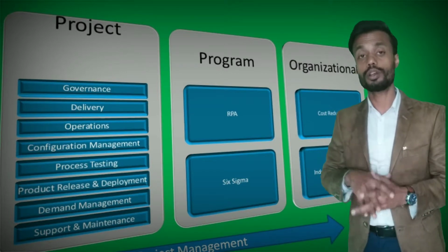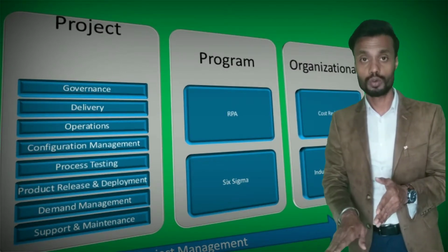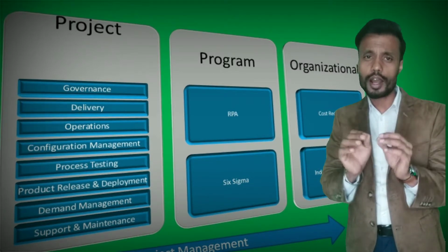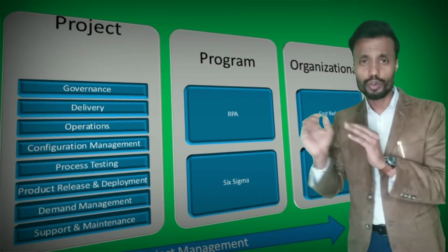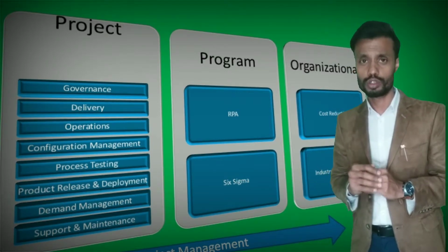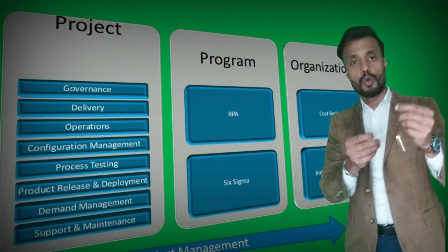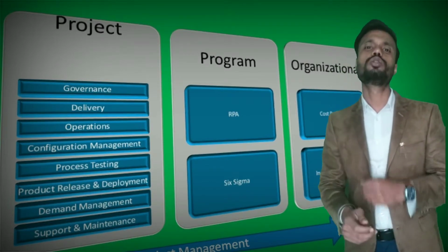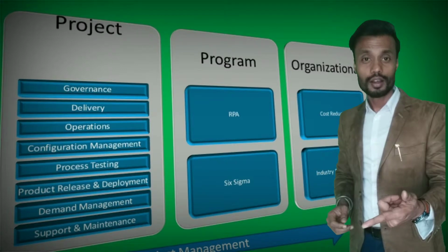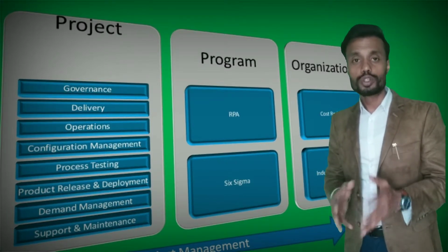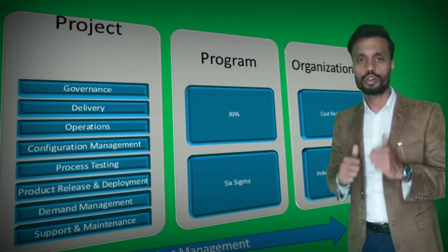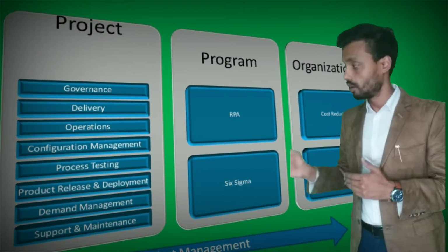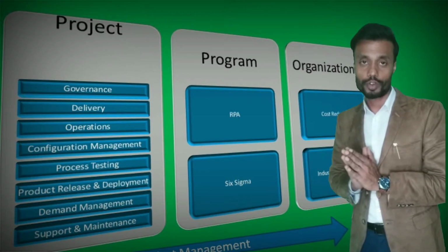Probably you are in a month of time where the volume is low. That is why there has to be a very smart program around your UAT. When are you going to do it? What month are you going to choose? How many people would be involved? What all cases you are going to take, what kind of volume you are going to take, what should be your user acceptance criteria? I mean, the criteria through which you would say, yeah, right, fine, my particular solution or my product is working fine. So this would be a part of your user acceptance testing or user testing.